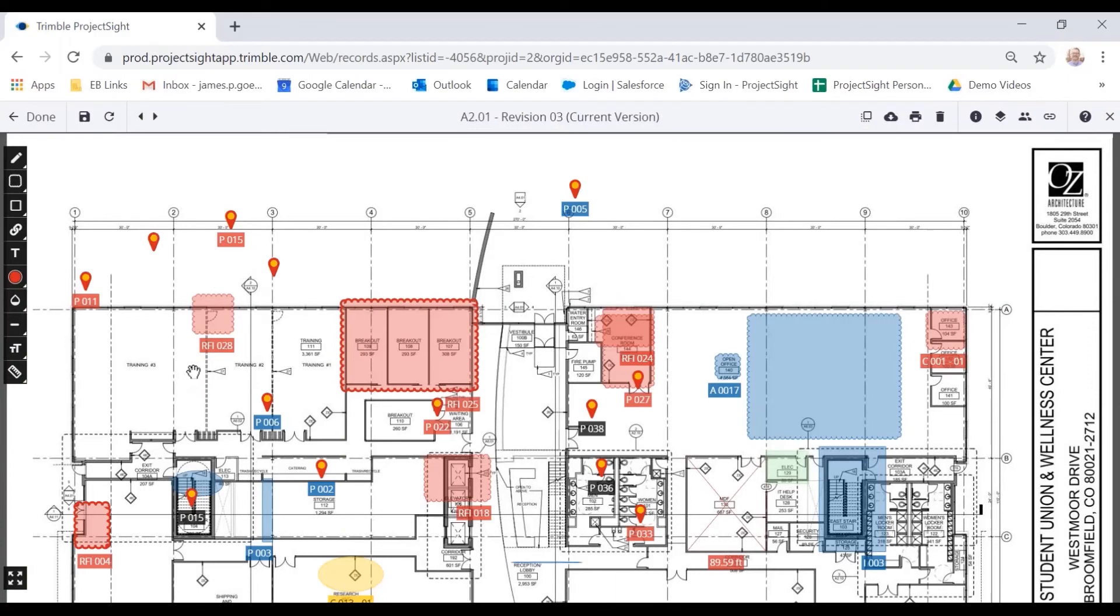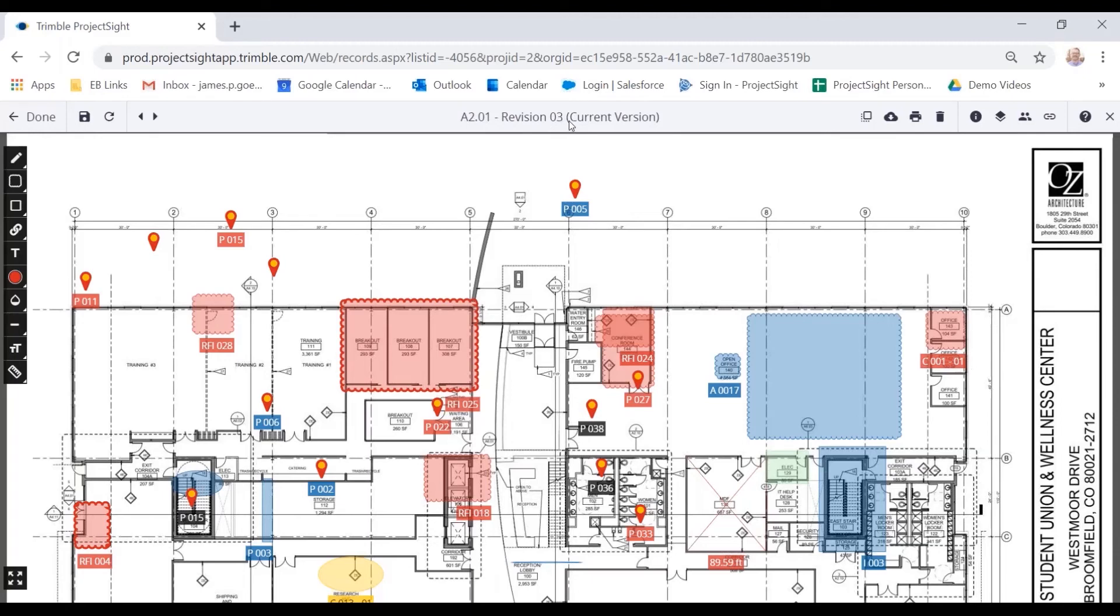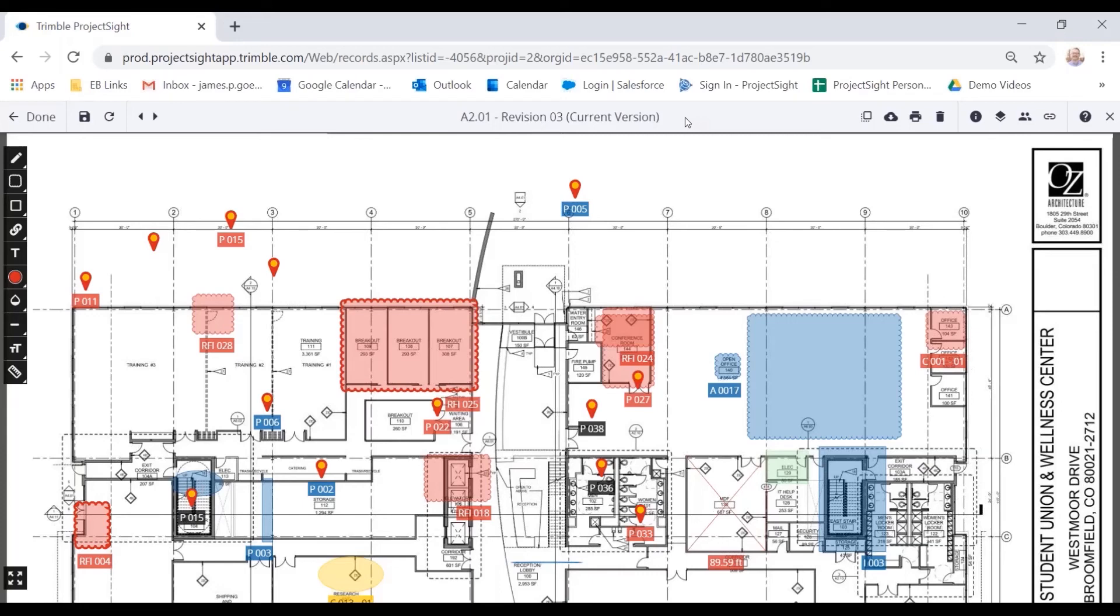First thing you'll notice is a lot of different colors and annotations on the drawing. We're going to focus on that here in a second. The first thing you'll see up at the top is it says revision three, current version. So anytime a new revision is loaded into the system, it replaces the old revision. That old one can certainly be found within the system, but any users using the drawings module to look at A201 are always going to be looking at the most recent, most current version.